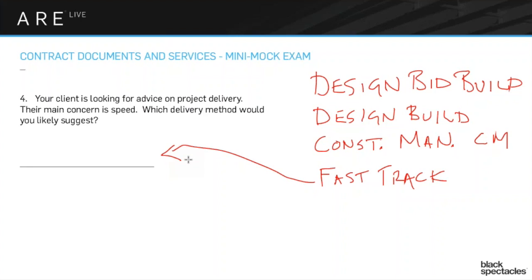The obvious disadvantage to designing while the building is going on is that you're going to make mistakes — you won't have all the information you need. For example, you might put the foundation in, but then decide down the road that you need plumbing in a different part of the building. Now someone has to go back and do it after the foundation is in instead of before, which costs a lot of extra money. So fast track is always more expensive because you have to make adaptations and change things.